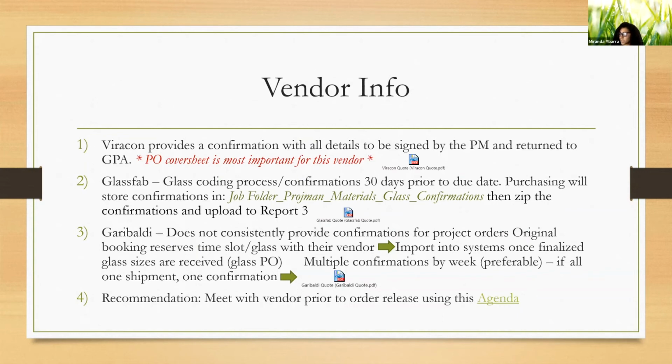And lastly, Garibaldi does not consistently provide confirmations for project orders. Your original booking will reserve the time slot, and then they will import it once the glass is finalized. And then multiple confirmations by week are preferable; if all one shipment, they'll send 1 confirmation.